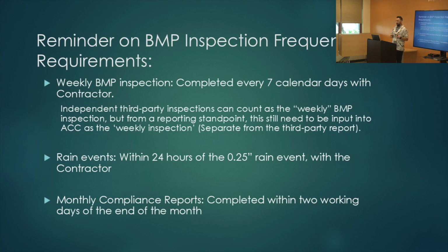And then rain events within 24 hours of over a 1/4 inch of rain, depending on your spec. I mean, that's the standard spec. If there's a special provision that changes that, then it would obviously be a little different. And then the monthly compliance reports are to be completed within 2 working days of the end of the month.